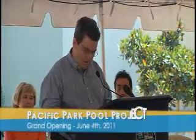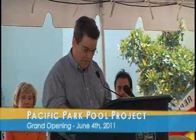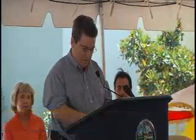Now here's, to me, what is really the most amazing part of this facility. We broke ground on this November 11th. The construction was completed on May 13th. George Hopkins and Company, and you'll hear from them shortly, really did a fabulous job. And I think that it really points to not only using a great company, but a great Glendale company. They were the general contractor, and the landscape contractor was RJM Design Group from San Juan Capistrano.